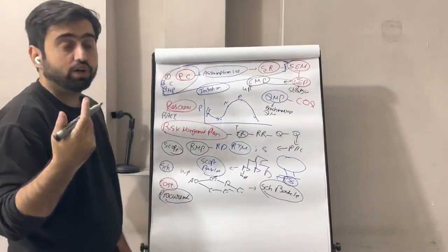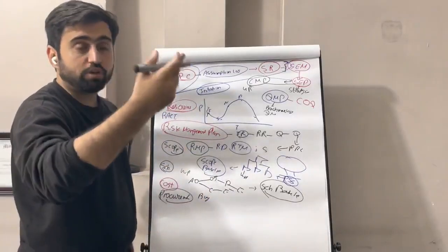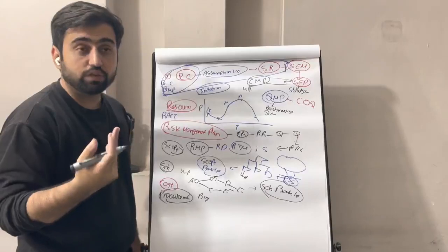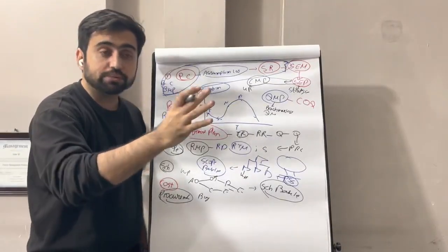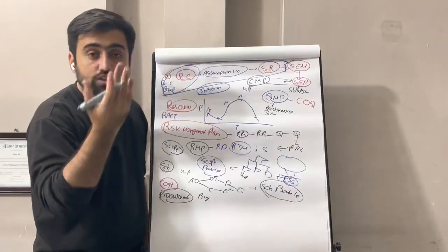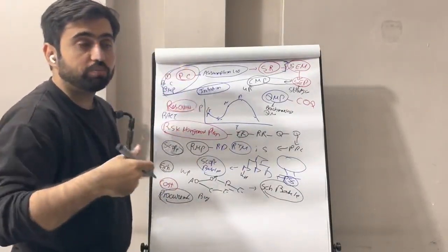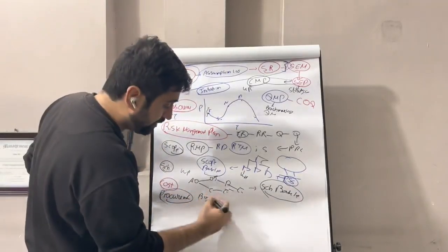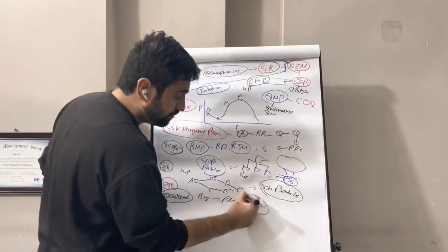If we decide we want to buy, then we see what we should buy from outside, what the source selection criteria are, what type of contract we have, depending upon the scope. If scope is fixed, we go with a fixed price contract. If not, then cost reimbursement or time and material. We select the contract. We go to the procurement phase, procurement strategy. As a result, we make the procurement management plan and procurement statement of work.